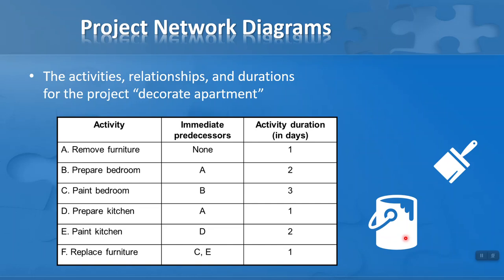Let's take a look at a very simple project: decorating my apartment. I've identified six activities. First, I need to remove the furniture. I've got two rooms — a bedroom and a kitchen — so I want to prepare the bedroom and paint the bedroom, then prepare the kitchen and paint the kitchen. When all of that is done, I put the furniture back. Activity A, remove furniture, has no immediate predecessors.